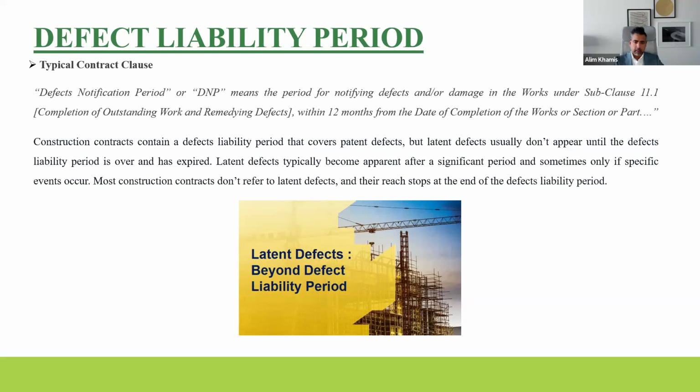What I've seen in certain situations is that if parties want to extend it beyond those 2 years, and this does get quite complex and messy, they may well try and circumvent it by having a supplementary agreement. A supplementary agreement then contains its own defect notification period and a defects liability, to get around the fact that you can't extend past 2 years. So this is effectively a standalone clause in a new agreement. That does have its fair share of legal challenges, but it is something that I have seen done in the past.